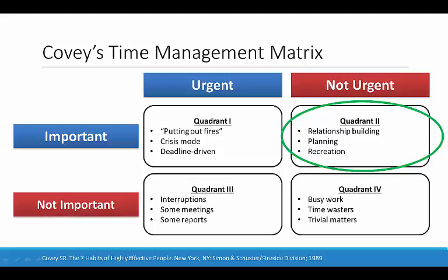I guess they call it Parkinson's law. It states that humans have a tendency, regardless of when the deadline is, to do all of our work right up until the deadline. So it's constantly brought up in project management not to just have a deadline that's way out in advance without having many deadlines that get you to the end deadline, because it's just our nature. We see a deadline, we find other things to fill up our calendar, whether it's meaningless busy work, answering emails, playing on social media, or whatever, rather than actually working, because we have a deadline that's way out.